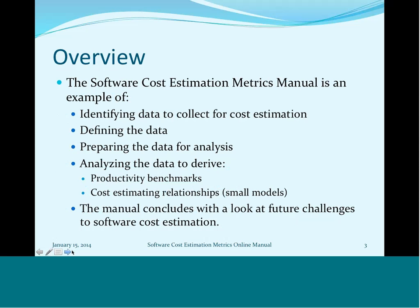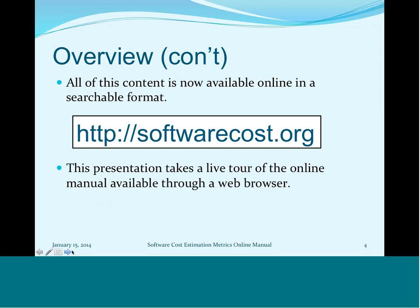The software cost estimation metrics manual is an example of identifying data to collect for cost estimation, defining the data, preparing data for analysis by comparing your data definitions to what has been collected, and analyzing data to derive productivity benchmarks for cost estimating relationships — which are very small models. The manual concludes with a look at future challenges in estimation. All content is available online in a searchable format at softwarecost.org. This presentation is a live tour of the online manual, accessible through a web browser.